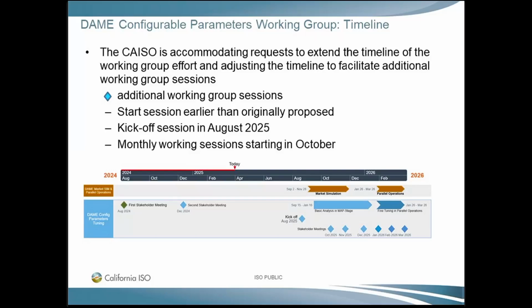So I do want to distinguish that while we do plan to deploy the code to production by February 1st, that code will not be active, and so there is still time to tune the values and decide on the final values for production prior to May 1st. So they just need to be available and in production prior to the first effective date.